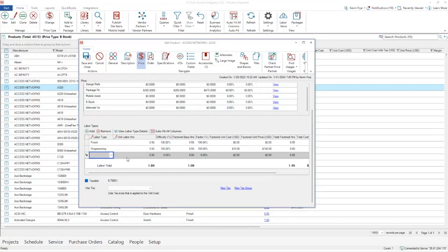And I would like to add that sometimes when I show something like this, where the installation or finish component is a half an hour, someone will make a comment like, well, what about the cable, or what about the back box? And yes, what about them? They all should have their own labor. In my opinion, in my best practice approach here, we assign labor to every item in the catalog. And so as we add these products together or accessorize products, right? We can have accessories here.